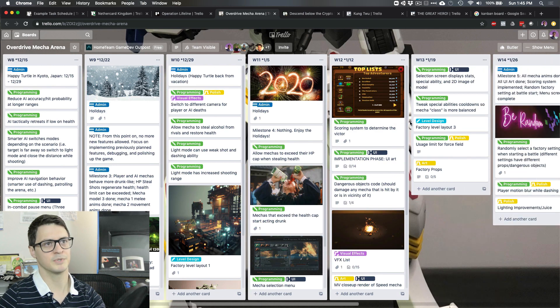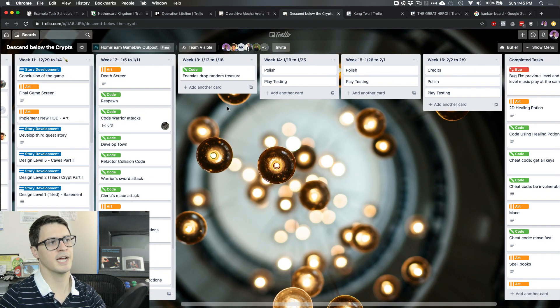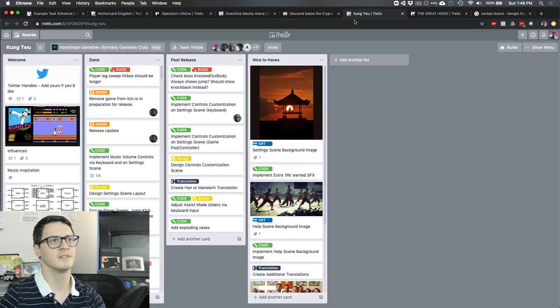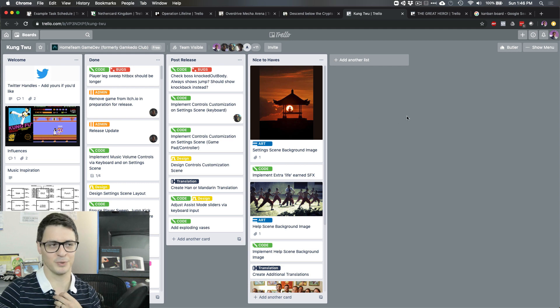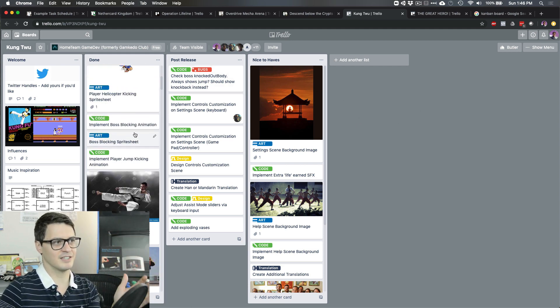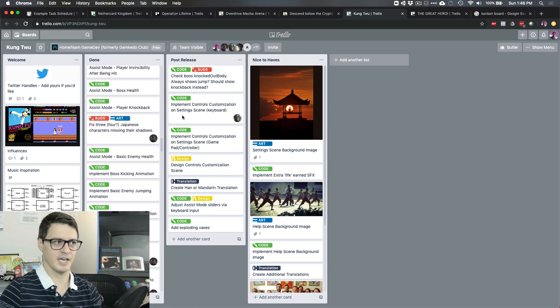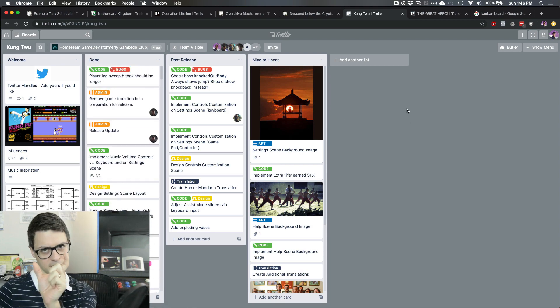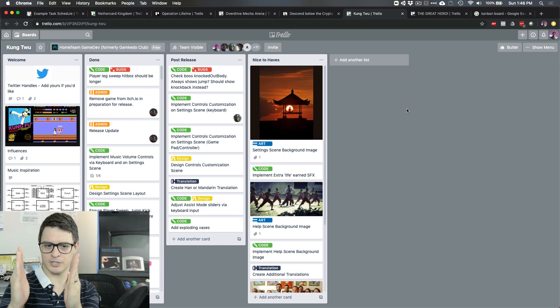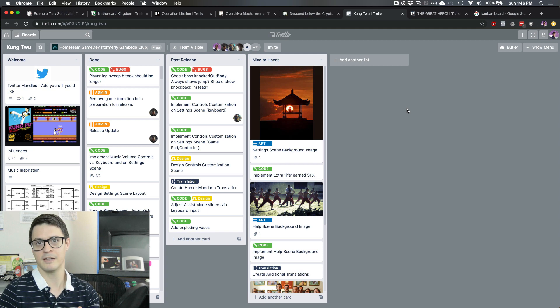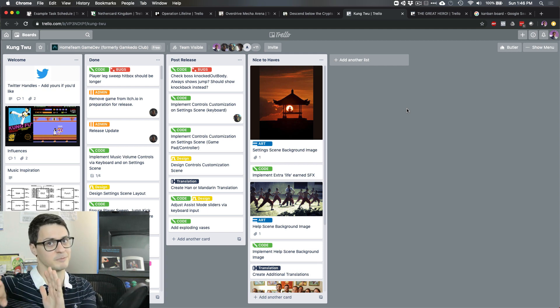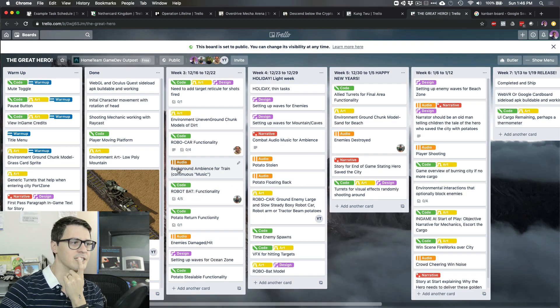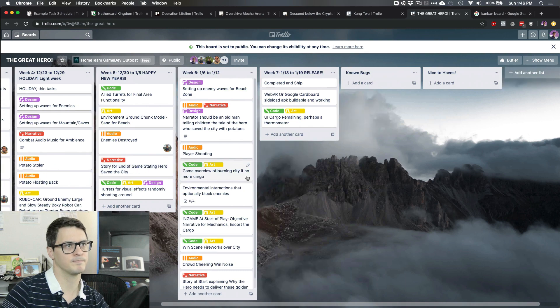And so we can schedule ahead what's supposed to be happening for any given week. Assemble of the Crypts, tasks, spread out some things. Kung Fu Wu. So here's an example of a finished project. Part of our visual language, we gray out the background when it's finished. But everything is in the done column. There's nothing left. We chewed away the weeks as the time caught up to us. And that helps us also visualize how much time we have left in a way that we start to see when there's two or three weeks left, we start prioritizing a little differently, right? We start cutting some things that aren't going to happen because we see that there's not as much room to keep shoving them forward. And again, it's very adaptive.